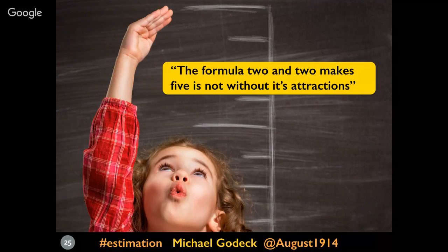And I'm not saying it's not useful in some ways, but you really need to recognize that velocity calculations based on an interval scale are based on a sloppy math that only sort of represent what's going on, and only if things are in a really consistent context, right? Otherwise, they represent like nothing, right? They could represent anything. And the thing is, they're really easy to bend the scale, right? If you're the guy that's calculating velocity and you can see that somebody wants to see a higher velocity from your team, then when you go into the next sprint, you can kind of encourage the base story to get rebased in such a way that it'll push the scale to report a higher velocity number, even if the team's doing less work. So you can actually get negative information out of doing it in that way.